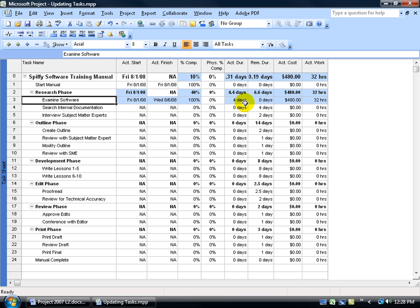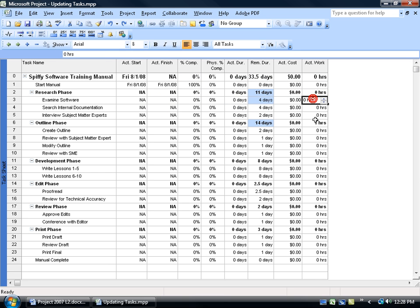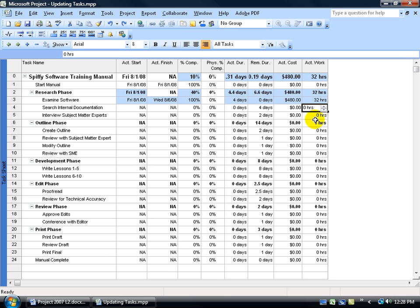Now you can do this other ways as well. If I come up here and hit Undo, and I come back in here and I say OK, the actual work was 32 hours and hit Enter. Again, you're looking at four days.